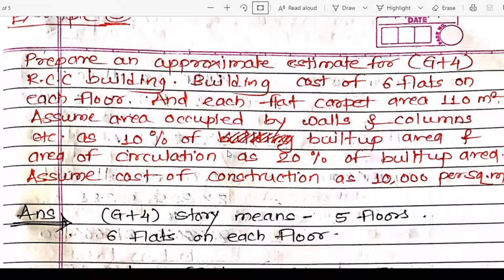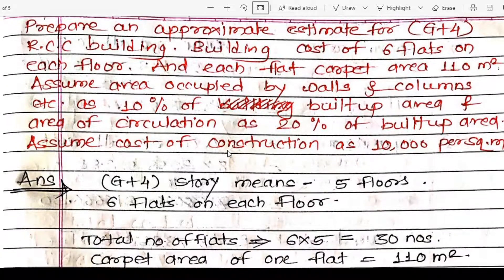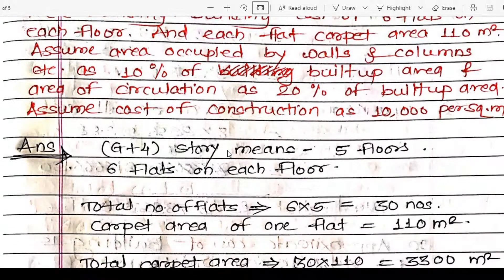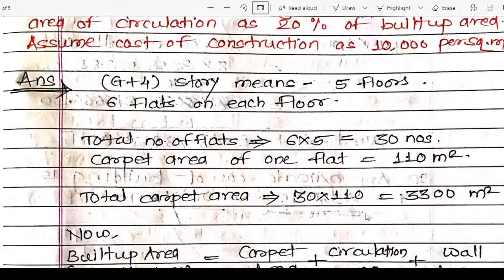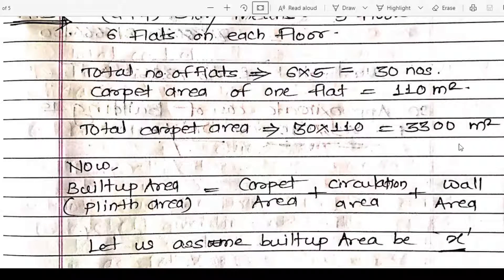The building consists of 6 flats on each floor, so total flats = 6 into 5 = 30 flats. The carpet area of one flat is 110 square meters. So the total carpet area is 30 flats into 110 square meters, which equals 3,300 square meters. This is the total carpet area of the building.